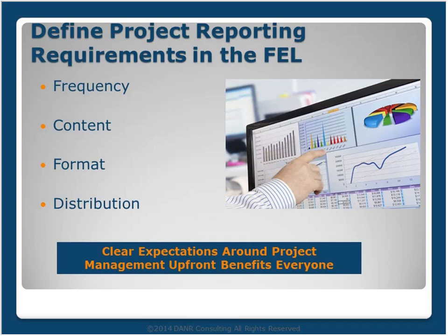So looking at that in a little more detail, as an example, consider project management reporting. The key considerations of project reporting are the frequency, how often you report, the content, what's in the report, the format, how the information is presented, and the distribution, who should receive the report and how is it delivered to them. All of these things are needed to establish the amount of project management effort required in the project.